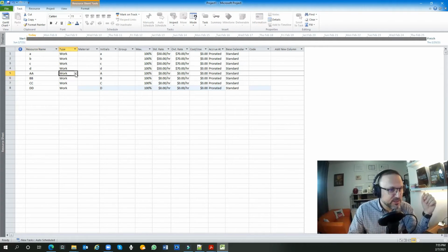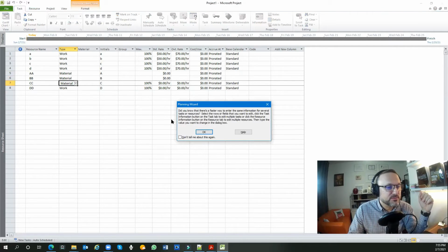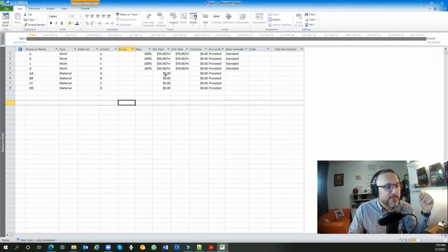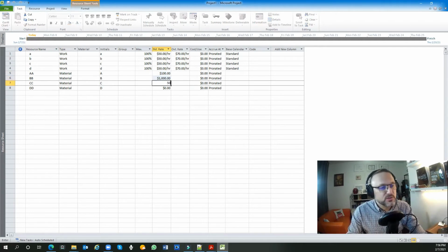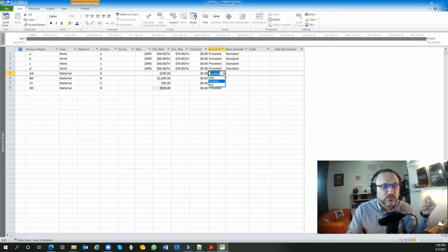So you will define it. Okay, activity A is material. This is also material, and this is also material. The cost of this material, let me say it's $100, this is $1,000, this is $50, and this is 500 US dollar. Okay, so you just mentioned it, and now you want to say, okay, this cost is at the start or at the end.